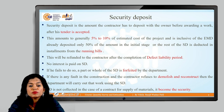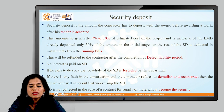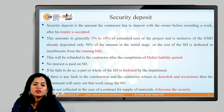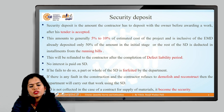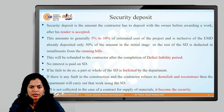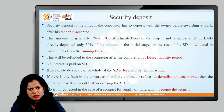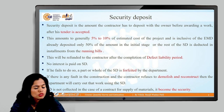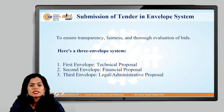The security deposit is refunded after the defect liability period, which is mentioned in the tender conditions — typically one to two years. If no repairs are needed, the whole amount is refunded. If repairs cost one lakh out of ten lakhs withheld, one lakh is used for repairs and the remaining nine lakhs are refunded after the defect liability period.